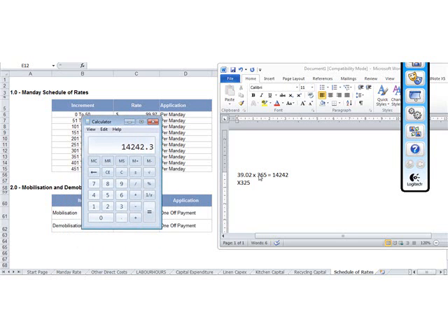We've now times that to bring it out to an annual rate, and now we're timesing it to bring it out to how many people are being accommodated. So the cost of that contract for the year is now $4,628,747. So obviously this is now a much greater expense and much easier for a client to see what this contract is actually going to cost them.